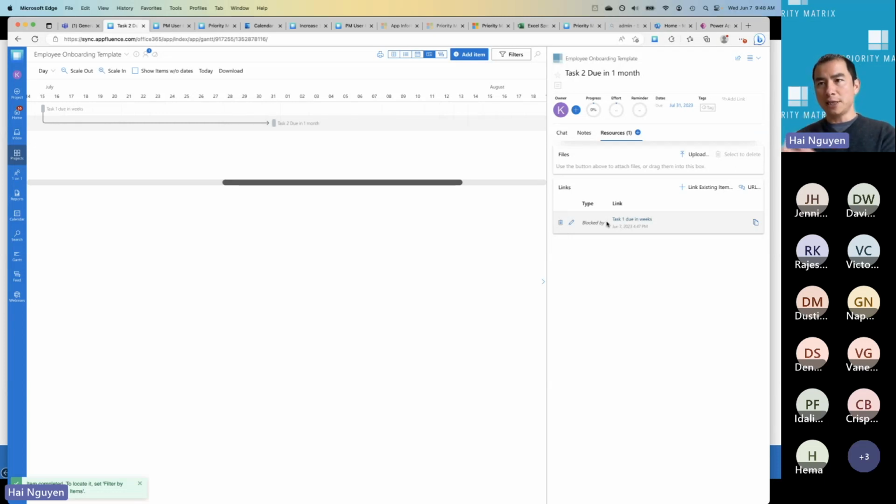But then you might have persistent projects. Persistent projects are those that last forever. So for example, within Affluent itself, we have 15 different projects related to product. For example, our Mac app, Windows app, iOS app, web app, as well as our integrations all have their own distinct projects, and those things last forever. So when you have projects that are repeated, but also might be launched over and over again for a specific purpose, that's when you really want to use a template.